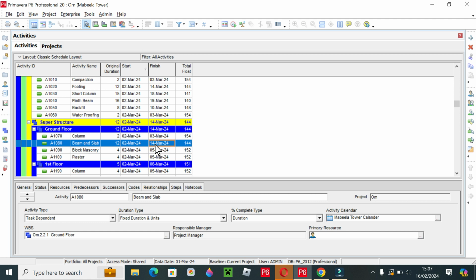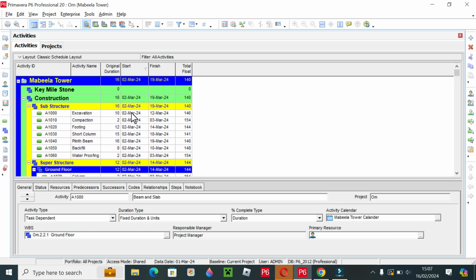But this is not correct, and it is not possible that all activities start on Monday, because we have just given the duration and the start and end date of the project to Primavera. We didn't give relations to Primavera. When we give relations, Primavera will also manage these dates. I will tell you about relationships in the next video.